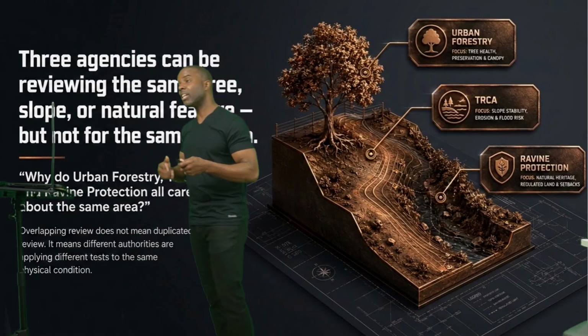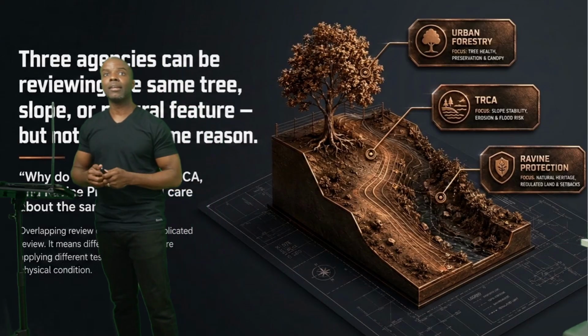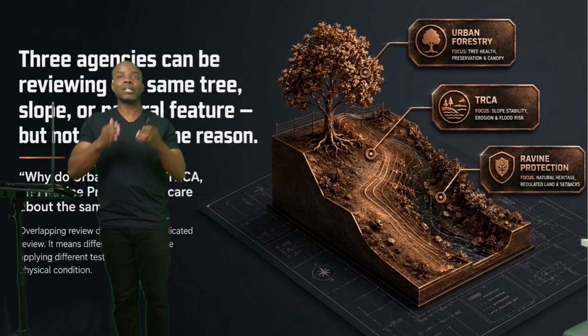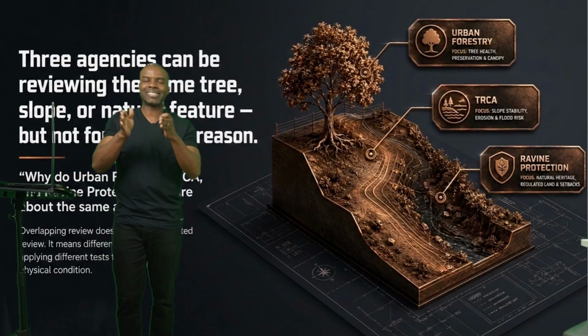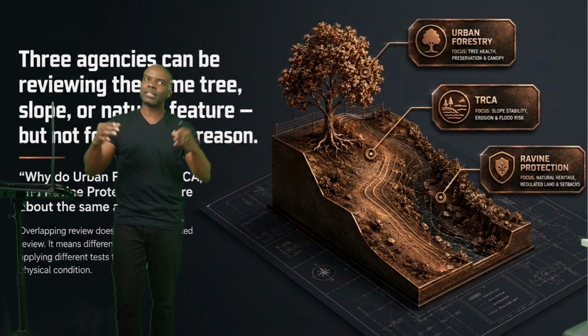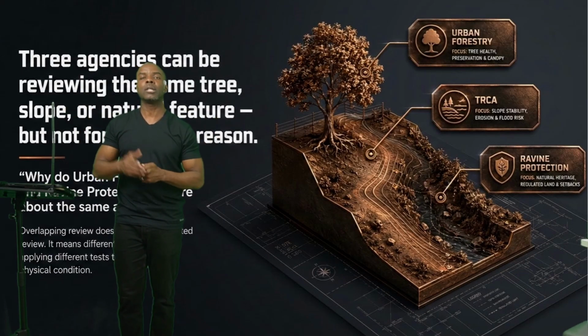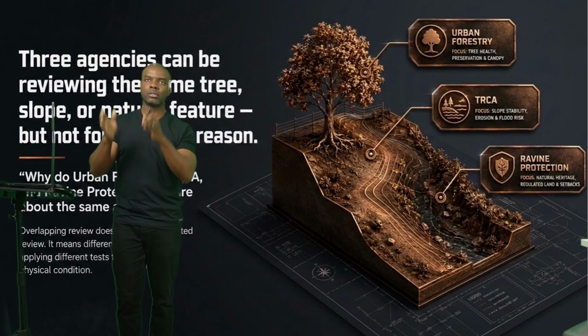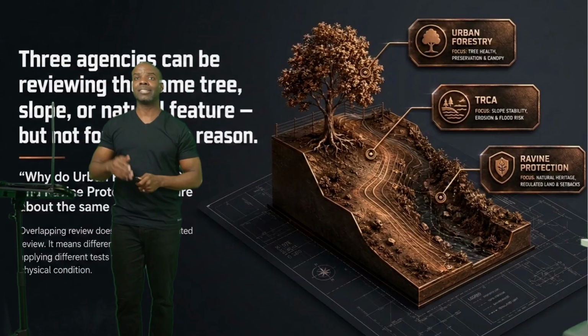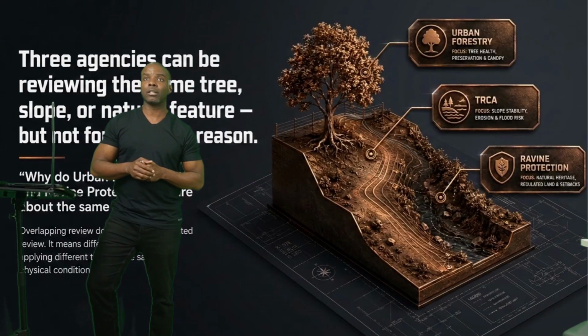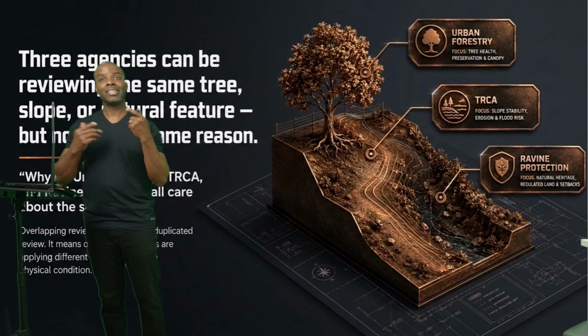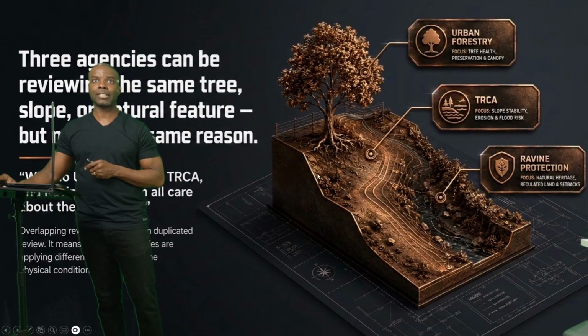So these three agencies all looked at the same thing for different reasons, and all of this had to happen in sequence. They didn't all look at it in one room and say, okay, let's all agree and shake hands on this. This happened first for 2 months, then another 2 months, then another 2 months, and now you end up in a cycle of carrying the cost on a project. These are things you need to assess from the onset.